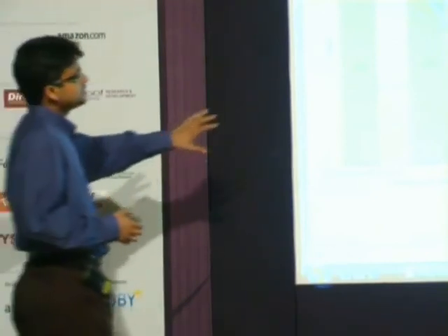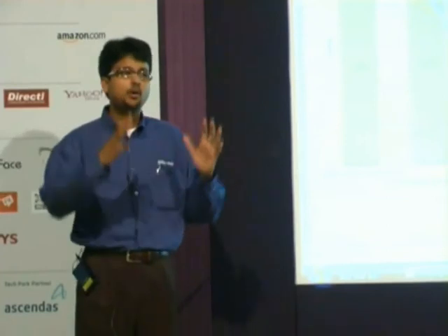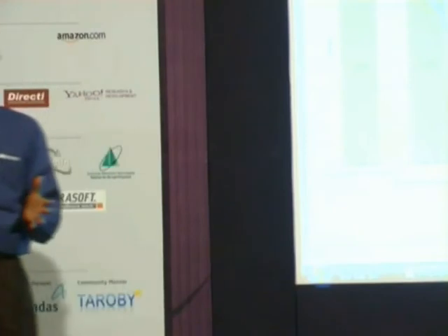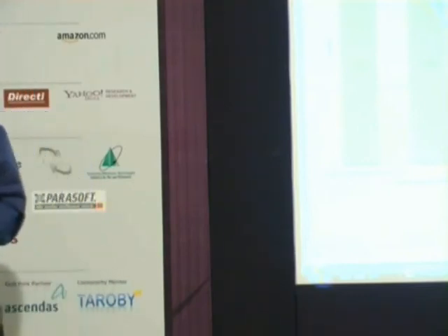So at a single glance, I have a very clear idea of my overall quality indicators for my project and whether there is risk associated with it. I'm coming towards the end of my iteration and I'm seeing a huge spike in active bugs, or the code churn is really high at that point. These are some of the things that you want to look at and say, well, should I rearrange resources, or are there things that I can do? Why is the code churn so high so close to the end of the iteration? Asking those kinds of questions really helps you drive towards a successful project.